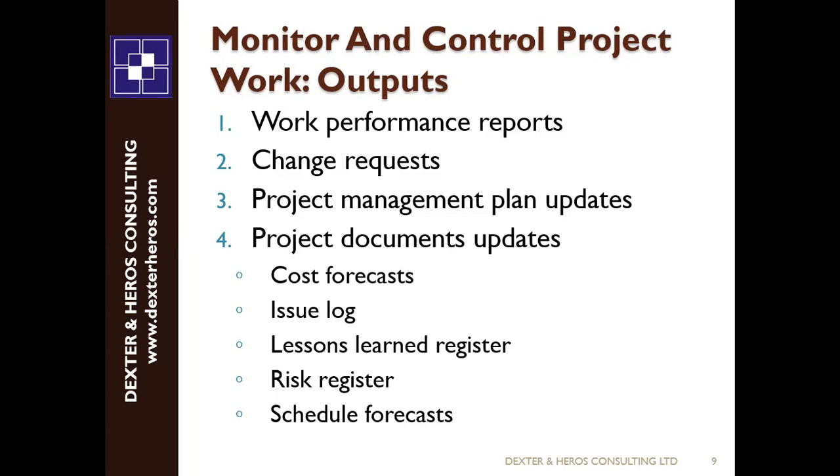Now, your project plan was reading that the project will last for 4 weeks. Now, it is no longer correct. It is no longer 4 weeks. You have now added 2 additional weeks, so that makes it 6 weeks. So 6 weeks is the actual schedule duration that should now be on your project. You need to go back and update it. You understand? That way, every time you make a change in your project, your project management plan is always updated to reflect the new changes you have made. So any change you make, whether it is approved or not, you always have an updated document that speaks about it.